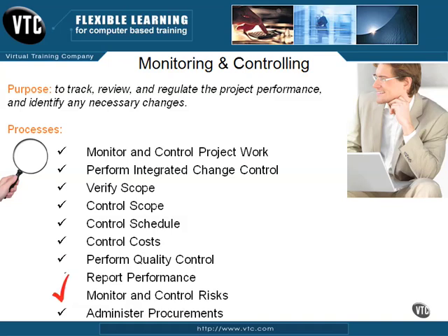Monitor and control risk comes next. Here, the purpose is to track the identified risks, execute the risk response plans, monitor the residual risks, which are those risks left over after the implementation of our risk response plan, and evaluate the effectiveness of the response plans and of the risk management processes. Certainly a lot goes on in this process.